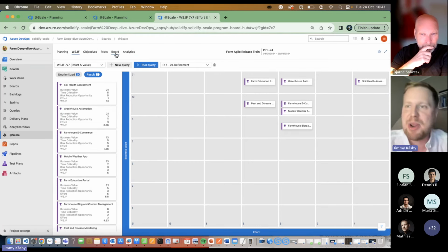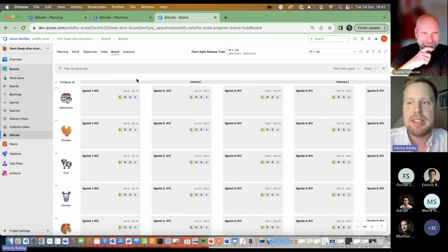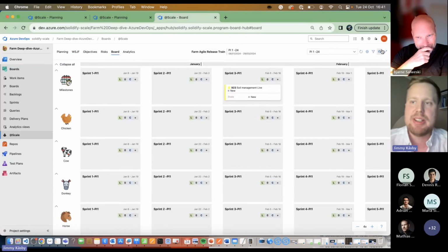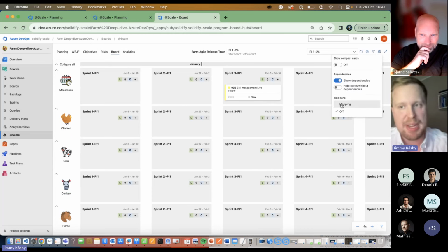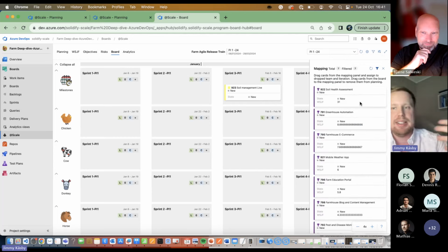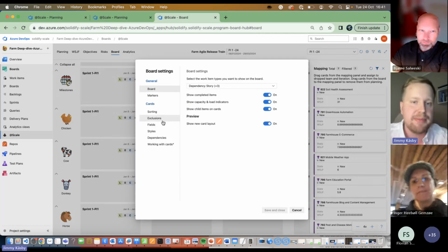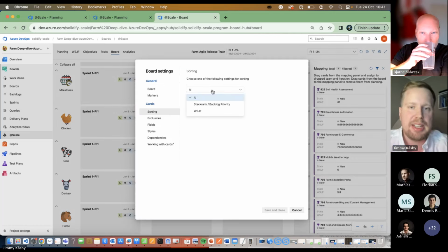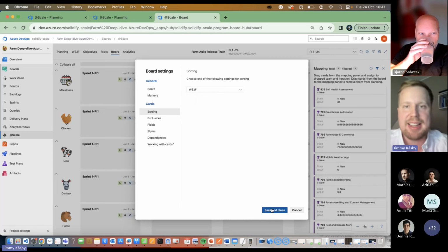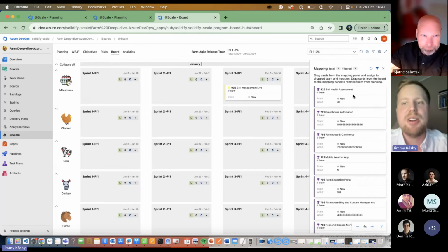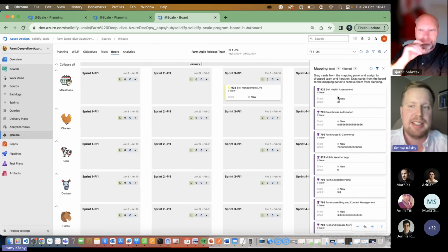Very quick here, we're about 9 minutes left. I'm going to jump into the board. It's currently an empty board, but if I click on the 3 lines here in that scale, we have something called the mapping pane. This is looking at the prioritized items. I have decided the sorting. Let's decide WSJF as well. I haven't added that. The higher the WSJF score something has, the first thing we should prioritize.